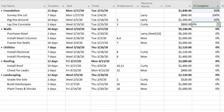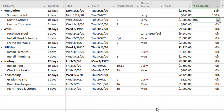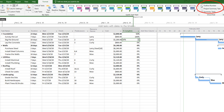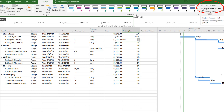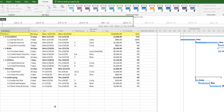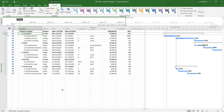Right now costs and durations are only summed by category. It would be helpful to have a summary at the top showing the entire project total. In the Format menu under Gantt Chart Tools, I can click Project Summary Task and Outline Number to get a summary row at the top and number all my activities for easy reference. At this point we've put together a pretty good schedule using the features in Microsoft Project that get used most often. Good luck on your projects.